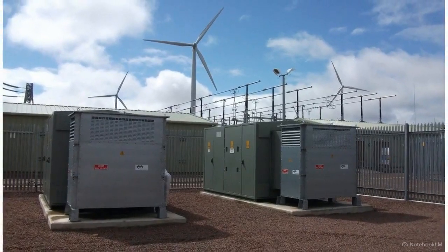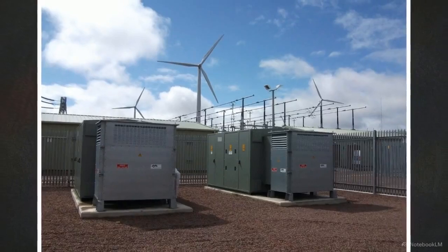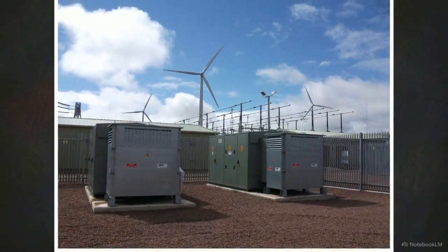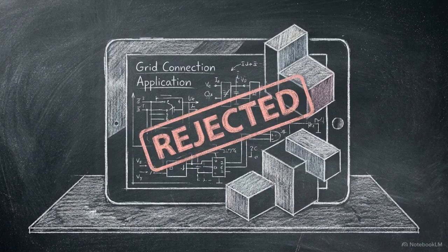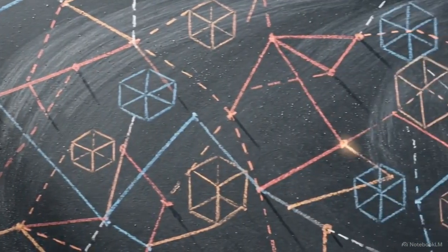Under the ERAC G5 standard, harmonic assessment is a mandatory critical path requirement for any new inverter-based connection in the UK. Without a passing report, the project cannot secure a grid connection offer. The challenge is that the distribution grid is never static.